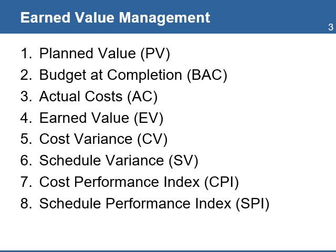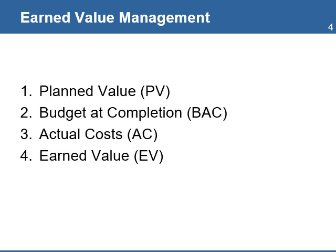EVM contains eight components that you need to be familiar with. Planned Value is the budget for a project, or the planned budget to be spent on a project during a given period of time. Planned Value for a specific date is the cumulative planned cost for each month between the start date and the status date.